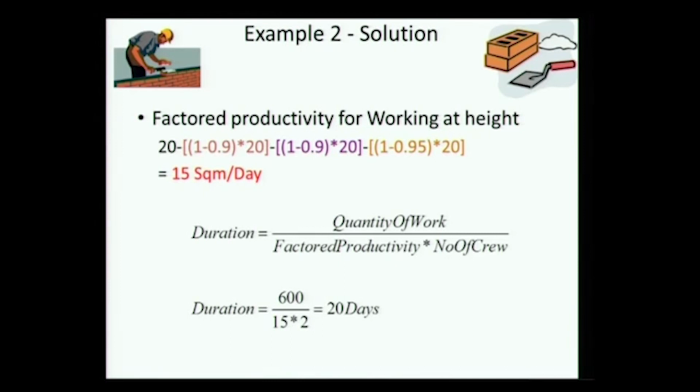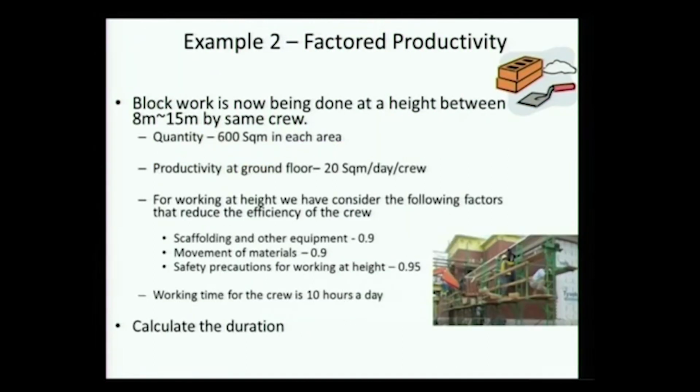And if you actually go into corporate productivity norms, they will have factors like this, and those are such closely held secrets, because based on this is what when you originally make a bid for it, if you have these factors right, then you get your bidding and your target price correct.